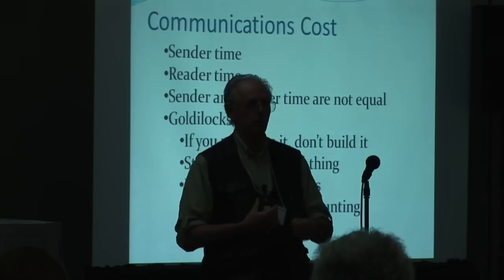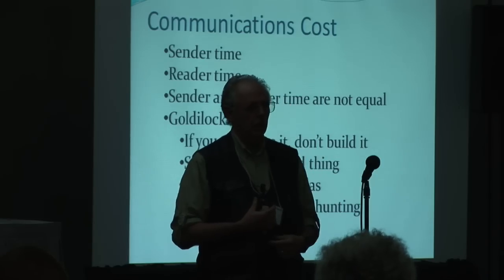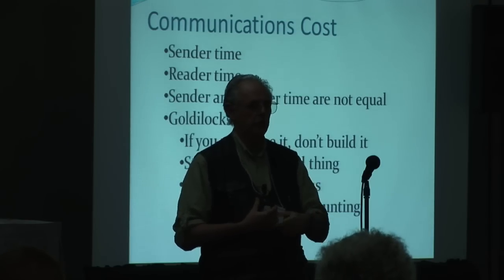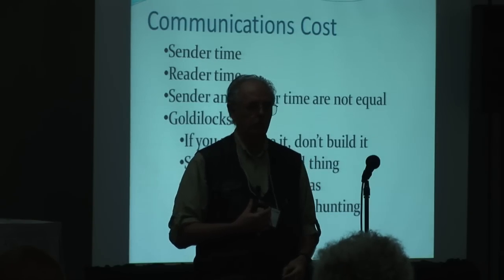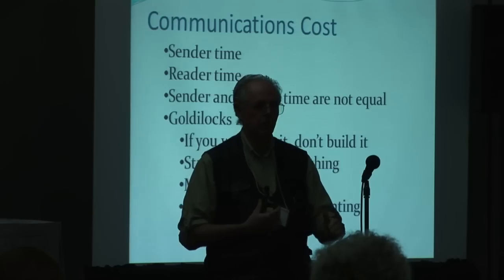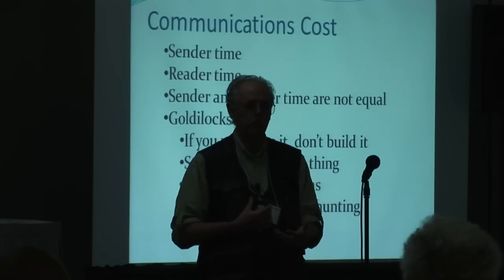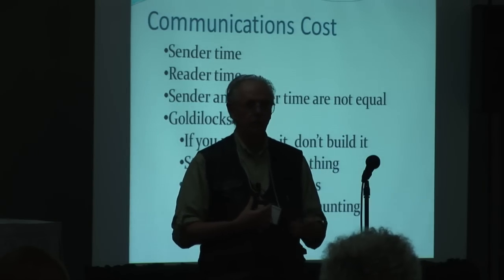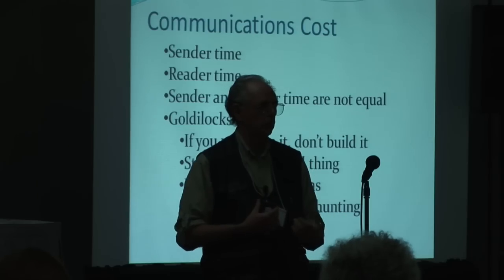It would be a couple of days reading through this document. They were usually about so thick, and it varied. Typically there was stuff in there that we were looking for that you couldn't find, and those would be flags. We can't find this, maybe we need to press them on it. Did they think about what the performance on the platform is going to be? What's going to be the minimum system? Who's on the team? What kind of experience do you have? Those are the kind of things we wanted to see, and sometimes it would be there, sometimes it wasn't. If it wasn't, red flag. But it would sometimes take a couple of days to go through it and really give it the work you need to give it.